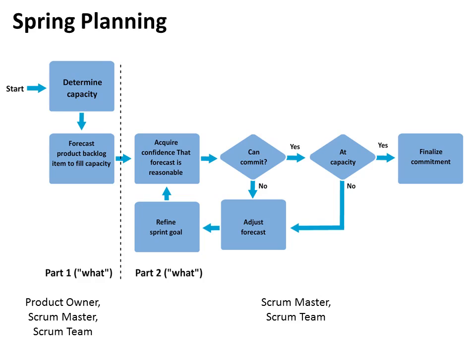Usually it involves breaking down the user stories into task level, identifying who will probably be doing what, and so forth, including looking at whether it's doable, can we commit to it, do we have enough capacity, etc. And then once it's finalized, they commit to it and work on completing it.